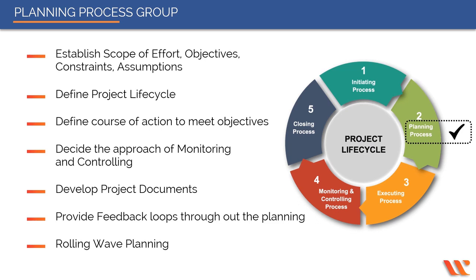Here you collect the requirements and define the scope. Next, you create a work breakdown structure, dividing the project into smaller, manageable ones. You define the activities, their sequence, what resources you will need to accomplish them, and how long these activities would last. You will also develop a schedule, putting in appropriate milestones to be delivered at each phase. You will create cost estimates and budgets based on these activities and factor in risks, issues, and the mitigation plan to counter or fix these.